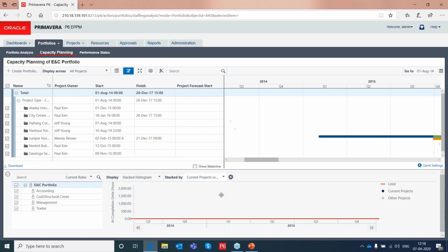No, it is not for the materials. No, because in one of your sessions you showed that in portfolio we can assign the persons as well as material in that group, and we can assure how in that administration part. So I thought it will be the same as that one. Now here, roles can be assigned for manpower and machinery, not for the material. So you can have it for role or role team. You can do it based on that, not for materials.